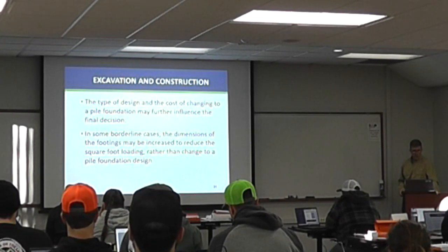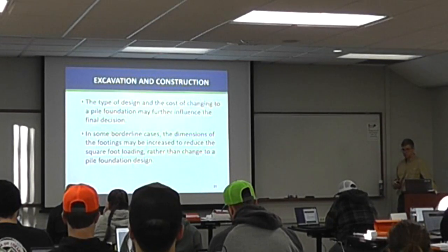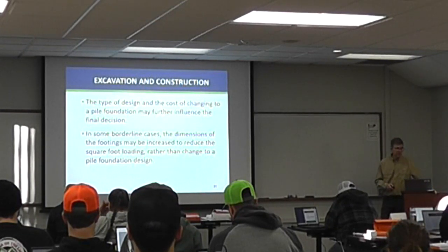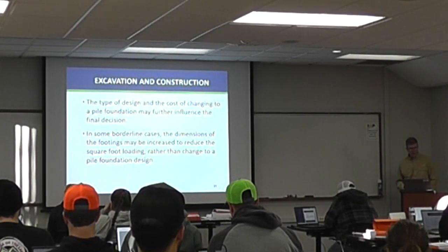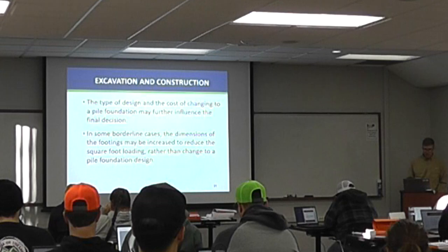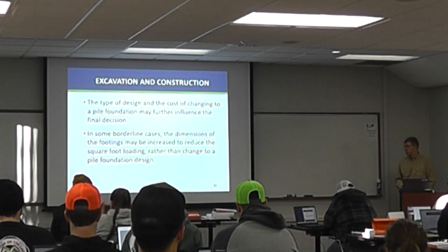So anytime we change something major like that, if we're changing from a spread footing to a pile, there's a lot of costs that are going to come along with it. And so in some cases, maybe we can increase the size of the footing rather than change to it.